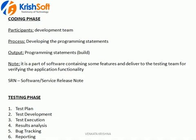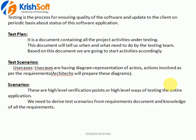In the test plan phase, we are going to plan all the testing activities right from beginning to ending of the project. The test plan talks about who is working on the project, what is in scope and out of scope, what software and tools we are using, when we are starting and ending, what deliverables we need to give the client, and what the bug life cycle is.